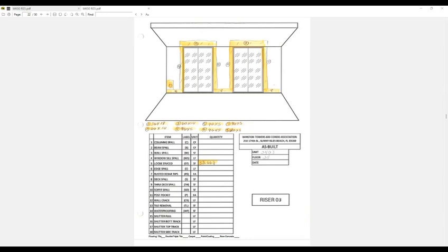The other, I understand, is the engineer of record. They review a pay application issued by CTC. The pay application issued by CTC is supposed to provide the quantities and the requisite documents under the contract, any partial releases of lien from any subcontractors, and so on and so forth.